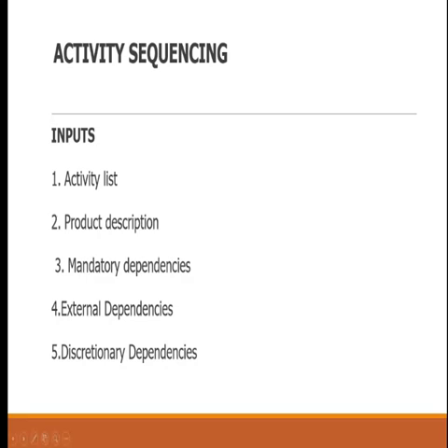All right, so that is very important. Let's look at the final one. Discretionary dependencies. Use your discretion. Don't use discretion until you have looked at your mandatory factors. Discretionary dependency means based on your choice. Okay, I don't want a POP, I think I like PVC. It's your choice. Okay, I like a parapet. I don't want this. It's your choice.